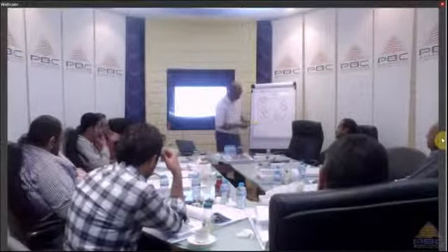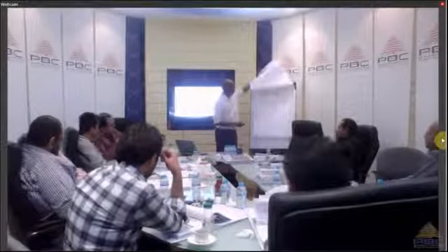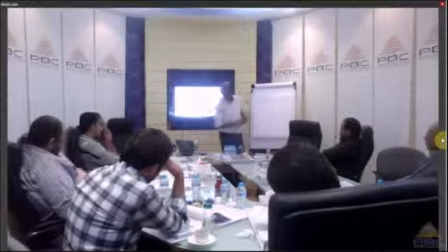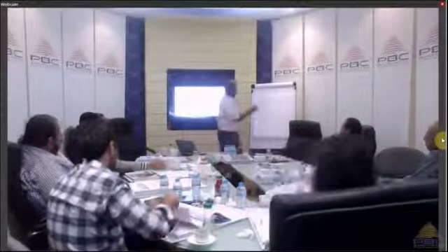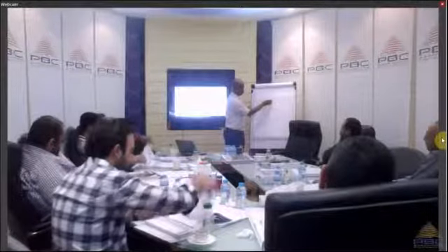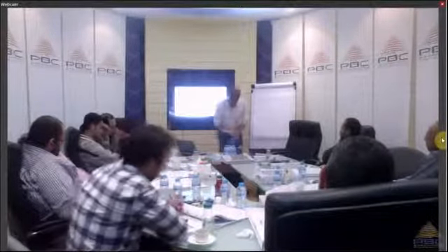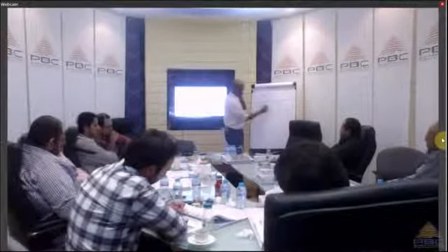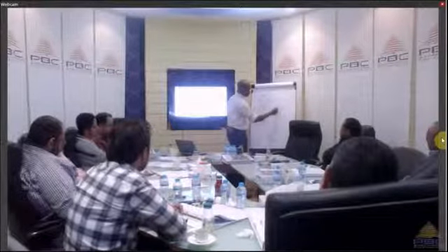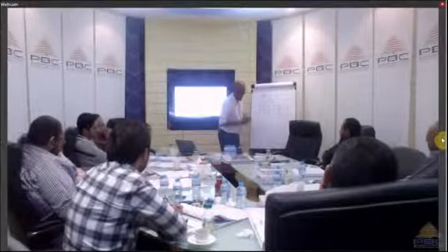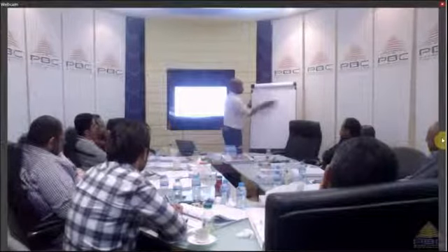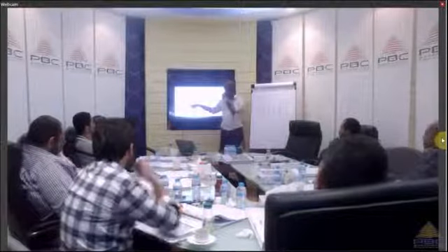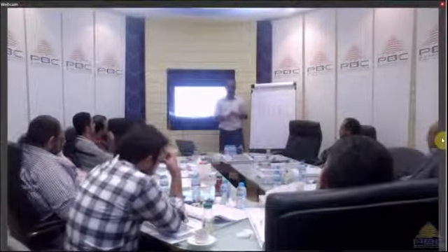Now, specifically in civil engineering or in the construction business, we also have something called the activity relationship or precedence relationships. Okay, so let's look into this example, activity A and activity B. You can have one of four relationships between those two activities. These are finish to start, finish to finish, start to start, start to finish.